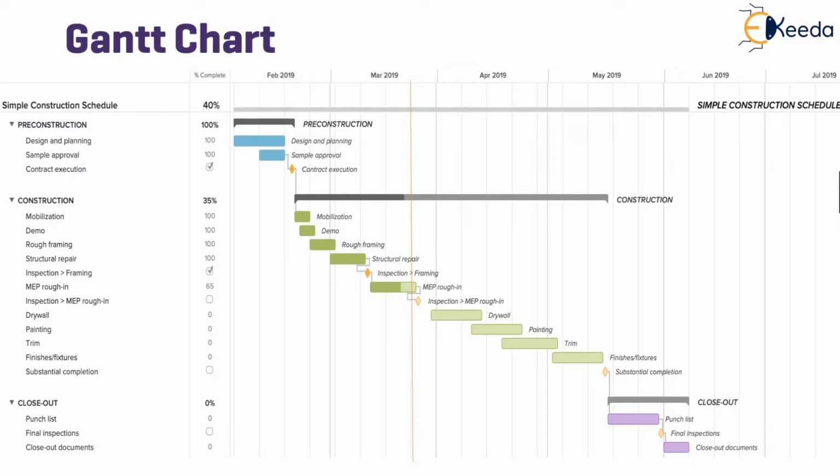Today's modern day Gantt chart is plotted using various types of tools in MSP, in Primavera, etc. They can be divided easily into work breakdown structures, which show summary tasks. The tasks are assigned start date and duration, the end date automatically calculated.